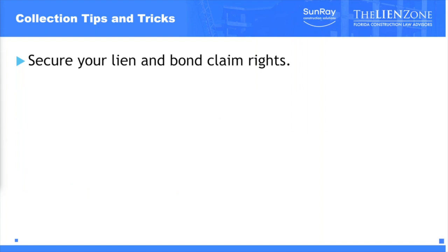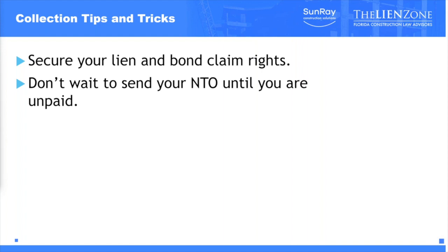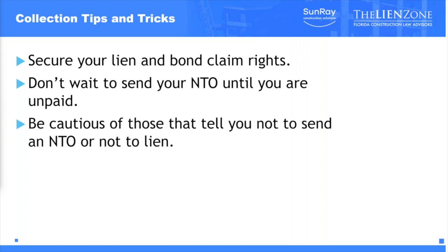You absolutely positively want to secure your lien and bond claim rights. Do not wait to send your notice to owner until you are unpaid. That is not the time to send the notice to owner. Again, as I told you, the best time to send the notice to owner is right when you sign the contract.